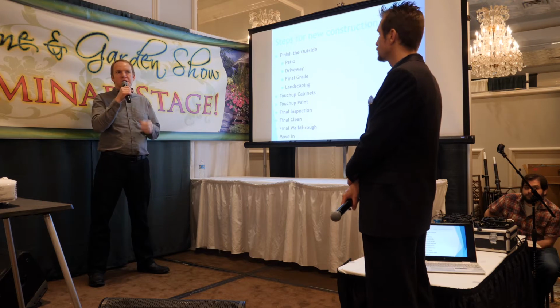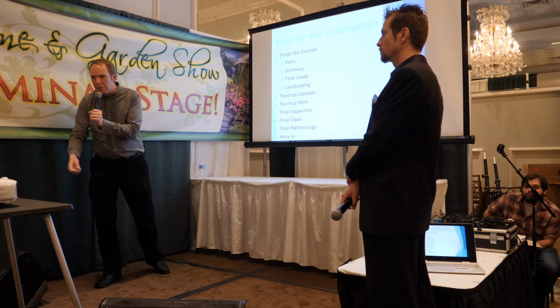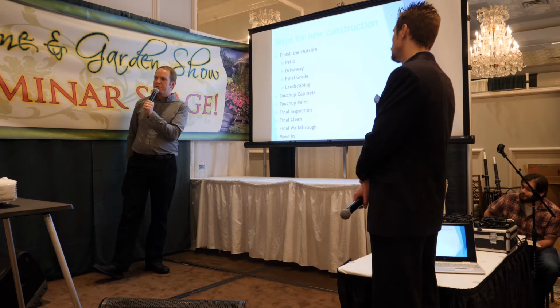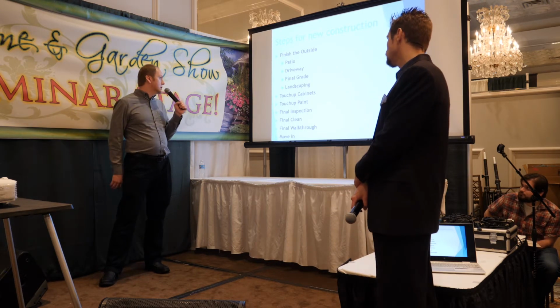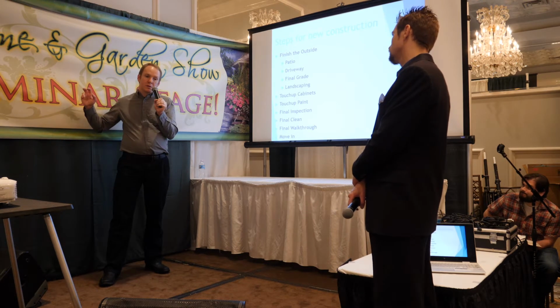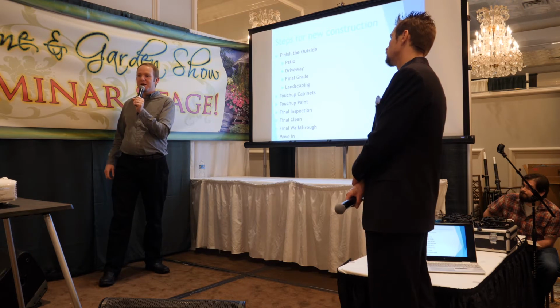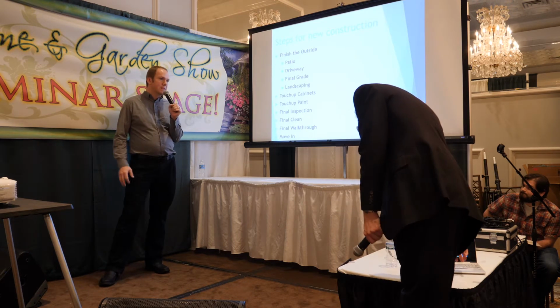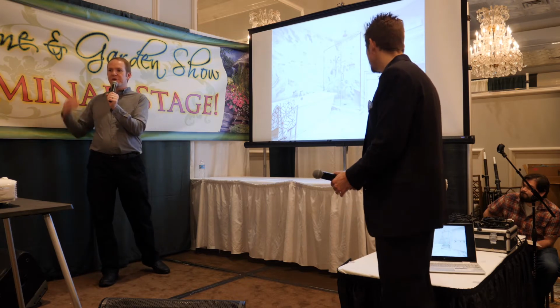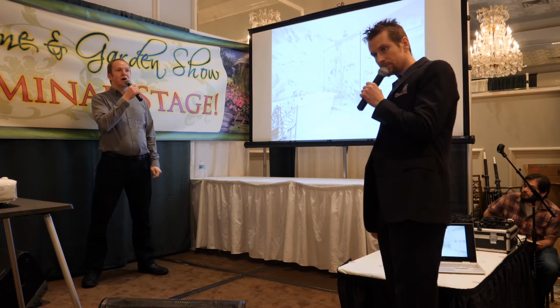And then if there are inspections that are required, which most cities require, then at that point you order your final inspections. For the electrical, they'll check the outlets, the GFIs, and all that stuff. So you want to have all that done at that point and have your final inspection. Get the house clean, do a final walkthrough, and call up United Van Lines and have them move your furniture in there. And then you enjoy your house.